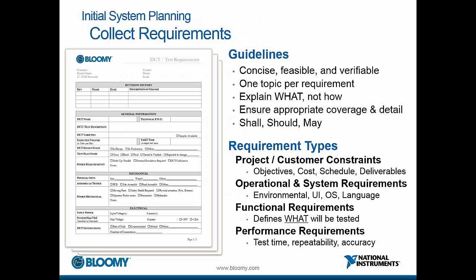The most logical place to start in our planning process is to define requirements. Requirements tell us exactly what we need to accomplish in order to complete the system. They should be concise, with only one topic per requirement. This allows each requirement to stand alone and be easily understood. Take care to ensure that all requirements are feasible, do not contradict one another, and that each one can be distinctly verified. This will be important during the implementation and validation portions of the project.